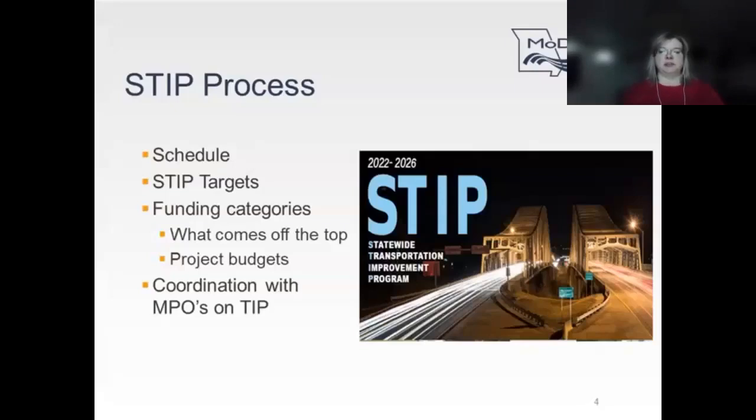Major bridge funds are used or set aside for districts to help pay for their major bridge improvement projects. And system improvement funds are used to supplement asset management and can also be used to help deliver intersection or interchange improvements, auxiliary lane additions, bicycle and pedestrian improvements, or in limited cases, capital improvement projects.